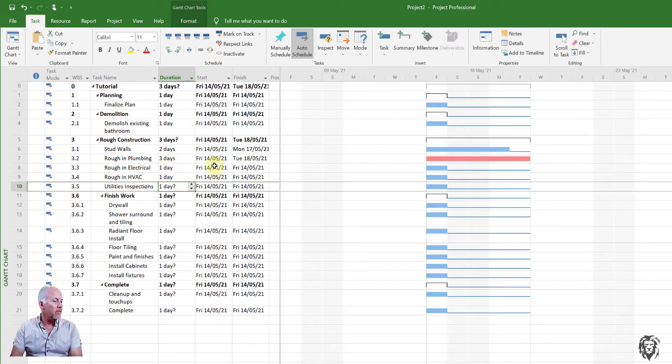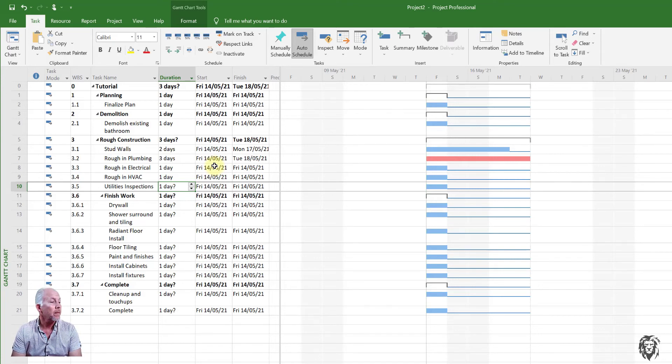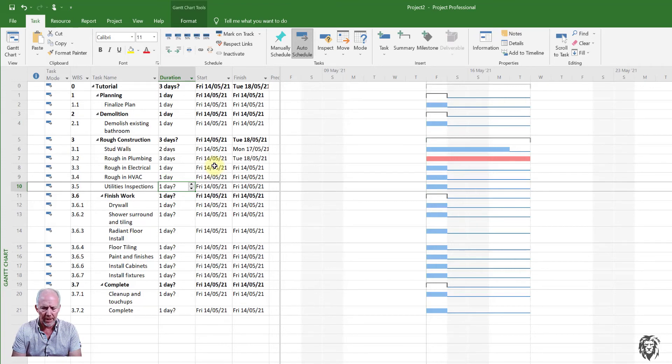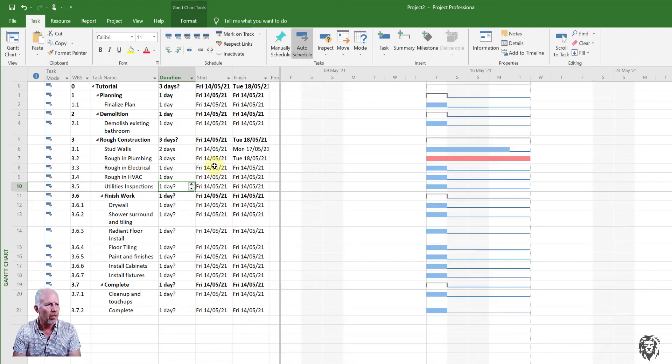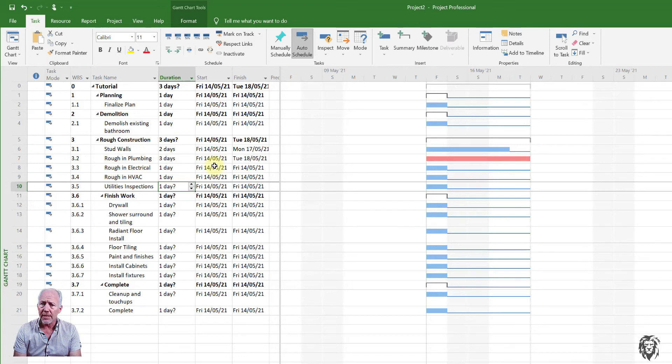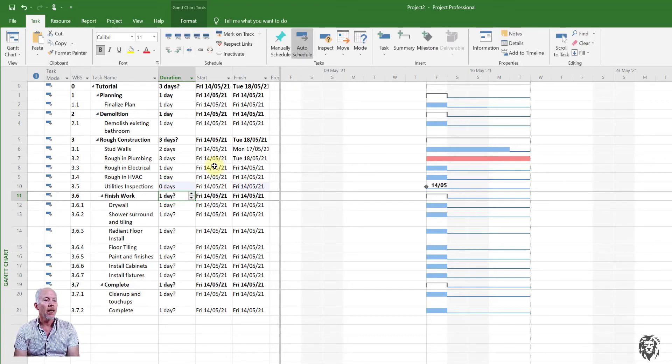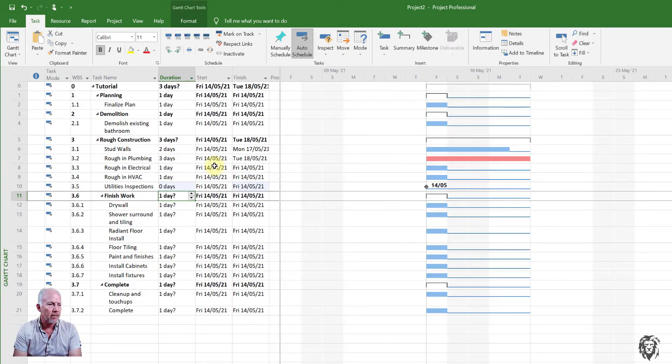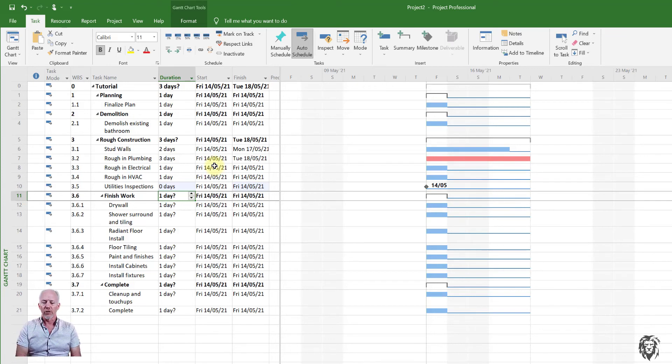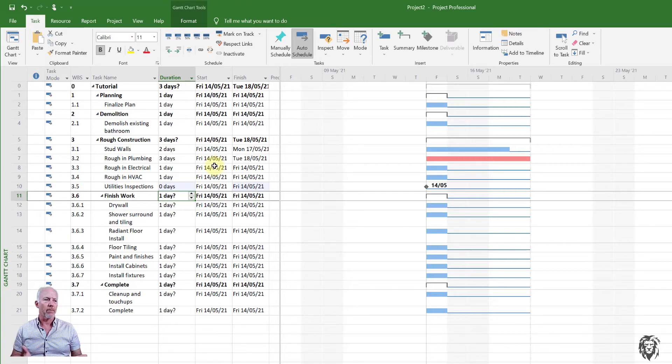Now I get down to a utilities inspection and depending on, I mean, I'm just going to use it as an example of a milestone. Now I'm not going to pretend that the inspections don't take time. They do take time, but this is a very, very small project. And you know, you can probably have your inspectors and all that in within an hour, two hours to get everything done. And so you might not want to attribute a day to it and you may not want to attribute even a couple hours. We might want to just track it as a milestone. Now what a milestone is, it's a zero activity task. So if I put in zero there and you see it shows up as this diamond, of course we can change that in our settings, but it's a good one, well recognized symbol. And so the milestone just occurs at a particular period of time. And they're used throughout the projects to show passage between phases and everything else. So we can set up our milestone.